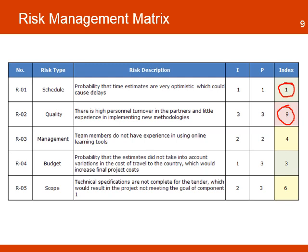In the case of the low index risk, the project team only needs to monitor the risk over time in case there are any changes. This risk management matrix needs to be updated on a regular basis since the probability of a risk tends to change over time.